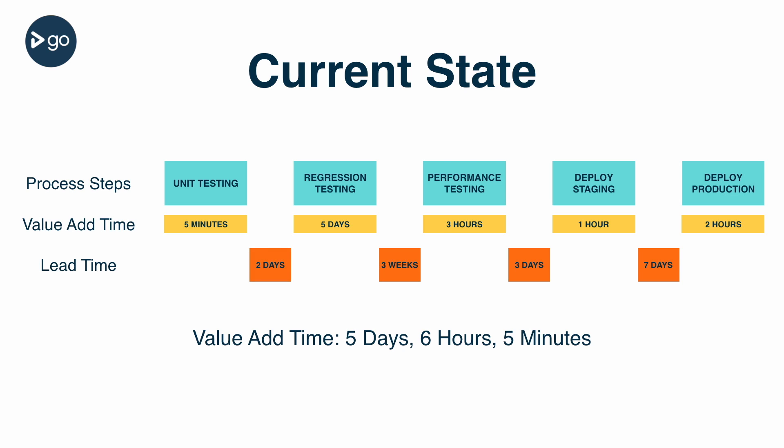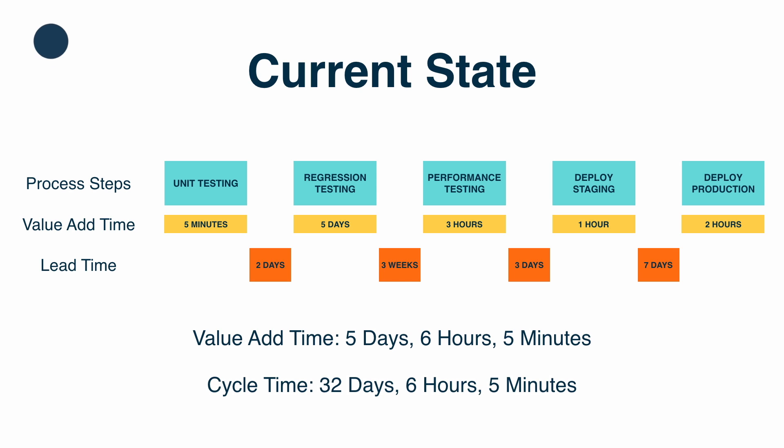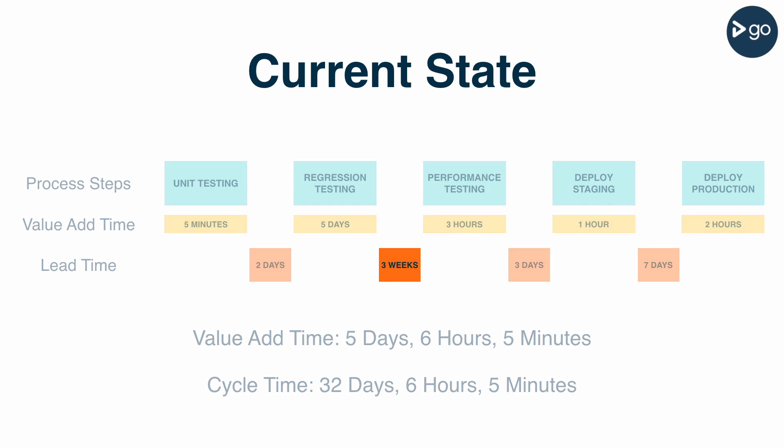The lead time for the team that does manual regression testing is a few days long for the same reason—system availability. We thought we could release around once a week with our current process, but in fact it's more than a month. The good news is we've identified an area where automation can help us cut a large amount of waste.